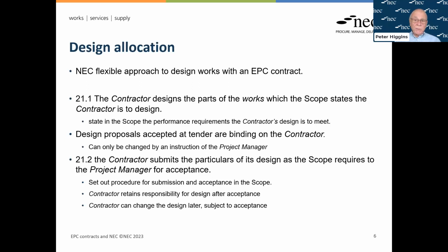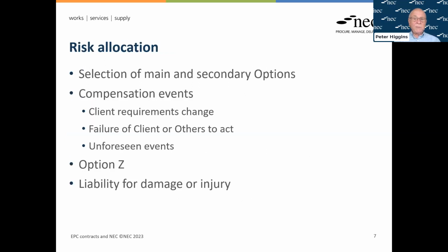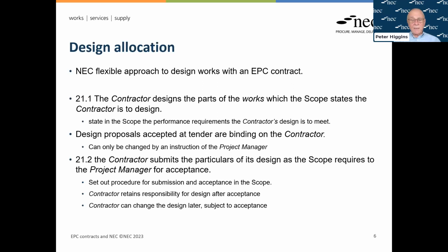And also, you need to bear in mind that having gone through that process, having got a design submission, accepting the design, the contractor is free under the NEC to come back later and say, look, I've changed my mind. I want to do a different design. This is the design I'm now proposing. Can you agree it? Contractor is allowed to do that. And the only grounds for rejecting it would be that it doesn't comply with the scope. So scope, again, quite crucial. You'll see it's fundamentally important to how you deal with the design allocation.